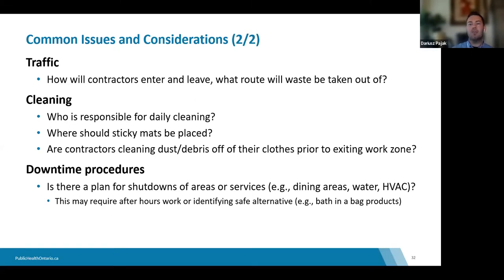Finally, risk management and emergency planning are essential — especially in light of the pandemic. You want plans in place for shutdowns, service interruptions, and other potential issues. If you need a power interruption or HVAC systems need to be turned off, decide with everyone what is the safest approach. For example, it may be best done at night when residents are asleep to limit the impact.